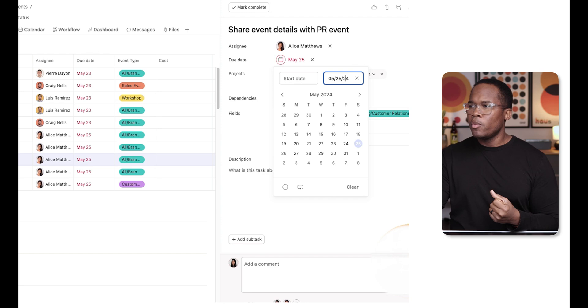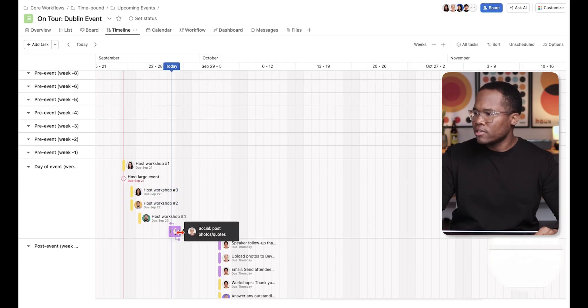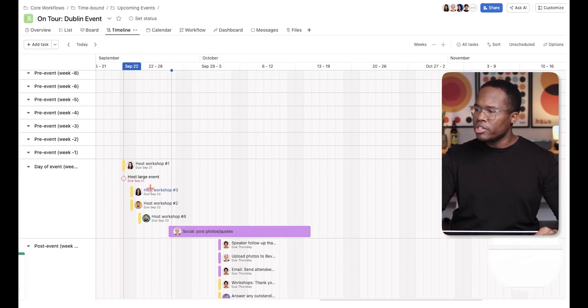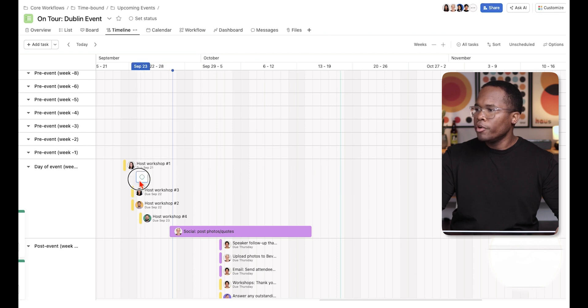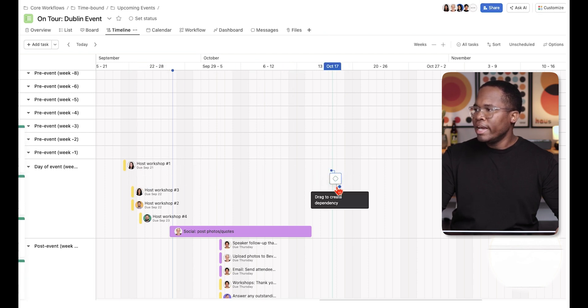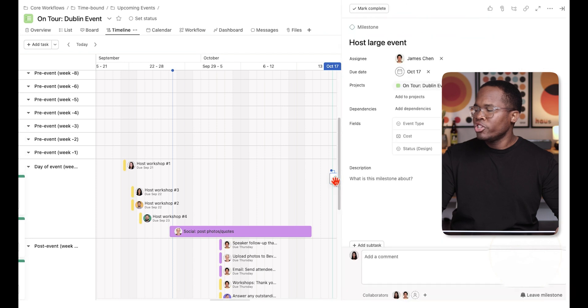If you're looking at this on a timeline, you can see all of the milestones because they're marked by that little triangle shape. You can change the duration of tasks, but on a milestone you don't have that option — you can only slip it around in time. For example, I've moved a milestone from an overdue status in the past to an on-track status in the future, and it changed to green.